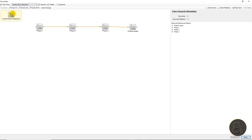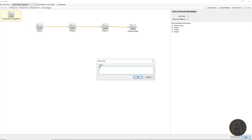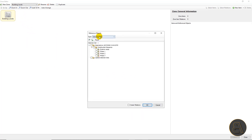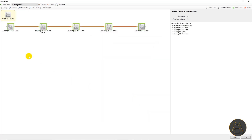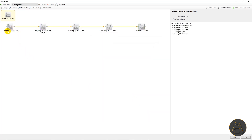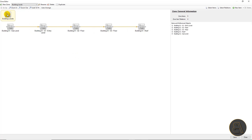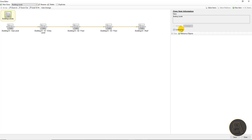While we have the relation selected, we can check that it's a finish-start type with zero lag. We must save this zone and move on to create our zone levels. Let's click new zone again and enter the name of our levels zone. We right-click on the blank area, choose new item and then linked. In the type field we'll choose building stories and check all building levels with the create relations option. Level zones are created with all relations and they are properly arranged. One more thing we need to do is click on the parent task and check the constructive option for this zone, which enables backward relations between building levels.